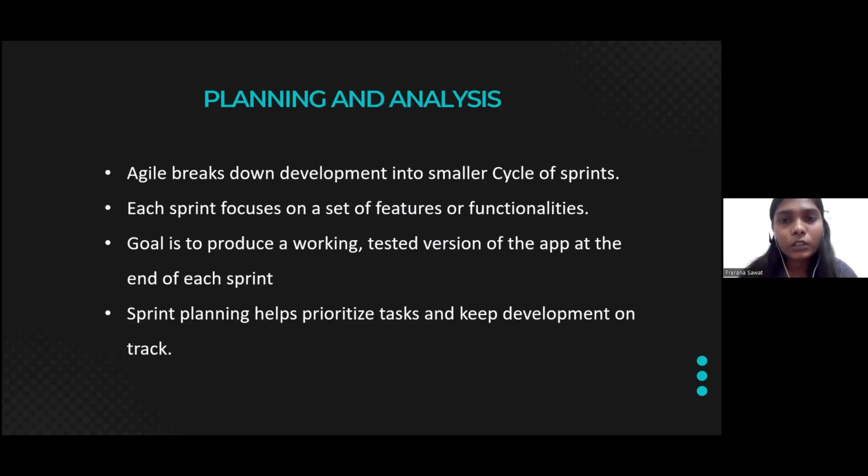Throughout the sprint, the teams continuously integrate code and conduct testing parallelly, side by side, with daily meetings to track the progress and address issues. At the sprint's end, a review collects stakeholders' feedback, influencing future priorities. Also, agile's iterative approach enables incremental progress, responsiveness to changes, and a focus on high quality software development.